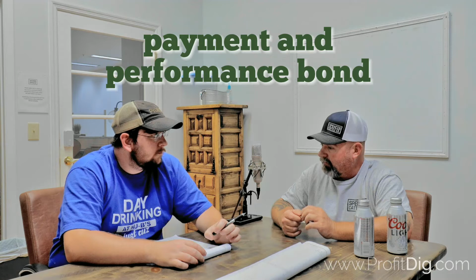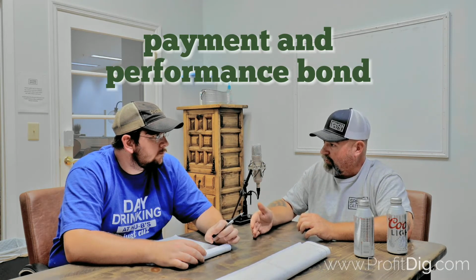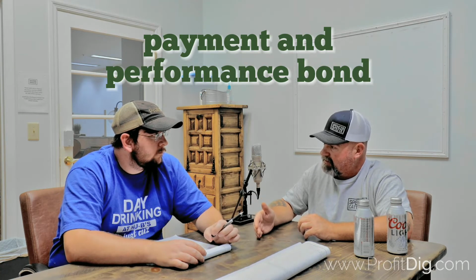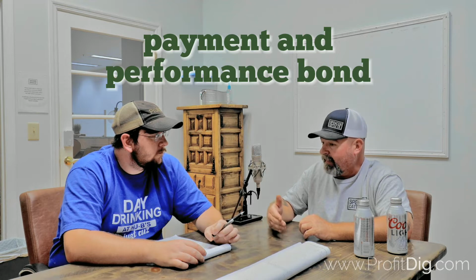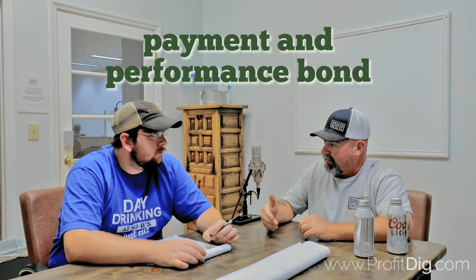So your insurance company has to pay a portion of what it's going to cost for that company to go ahead and find someone else, maybe the second place bidder, maybe a totally different contractor that didn't even bid on the project, to come in and complete your work that you did not finish.